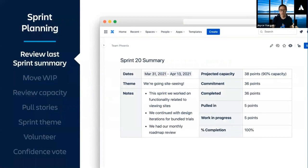Here are the steps my team goes through in sprint planning. First, we take a look at a summary of the last sprint. We talk about what the goal was, how many points we committed to versus how many we completed, and any unique events or circumstances that may have impacted the sprint.